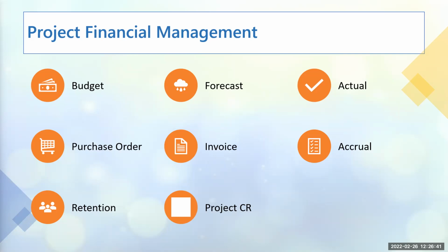They put all of this together to define what will be delivered, to say this is the amount we need or the funding we need to be able to deliver that project, and that forms your project budget. To some extent, project budget doesn't change, except when we have a PCR, which is the project change control. And that could happen anytime within the project. But project budget is usually set at the beginning of the project.